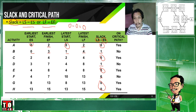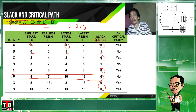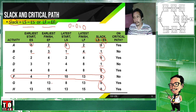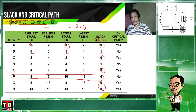Like Activity F — notice that its slack value is quite high: six. So you have six weeks of leeway for Activity F. Now, after determining the slack values, look at whether each activity is on the critical path or not on the critical path.